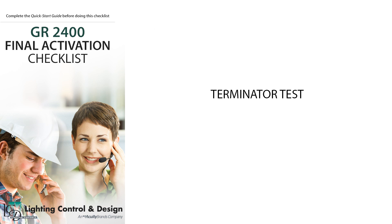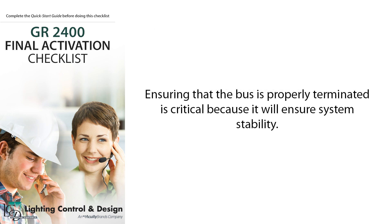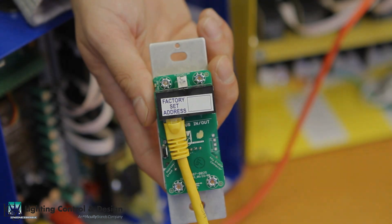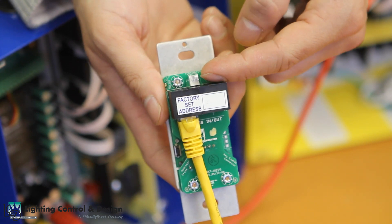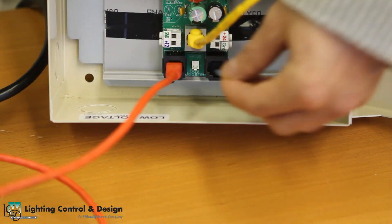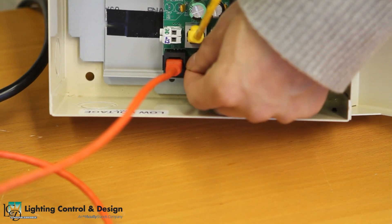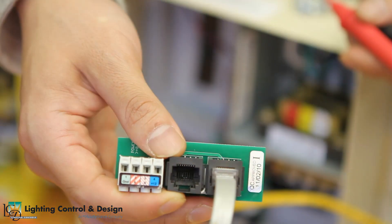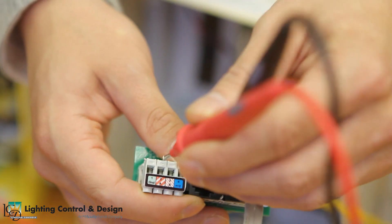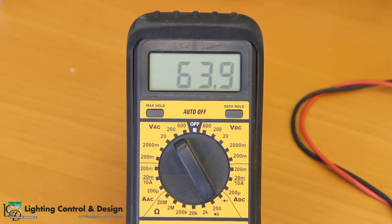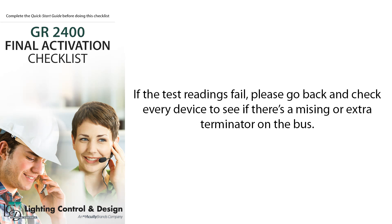After all three tests have passed, the very last test is the terminator test. Ensuring that the bus is properly terminated is critical because it will ensure system stability. Every device will have a two-pin terminal where the terminator can be plugged in. Only the first and last device should be terminated. Once the bus has been terminated properly, measure resistance across A and B. This reading should be between 60 to 90 ohms. If the test readings fail, please go back and check every device for a missing or extra terminator on the bus.